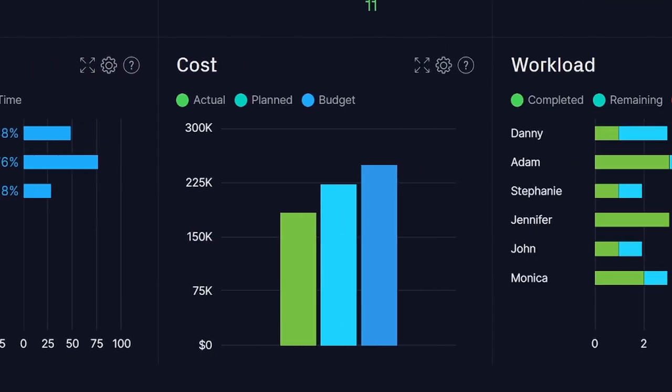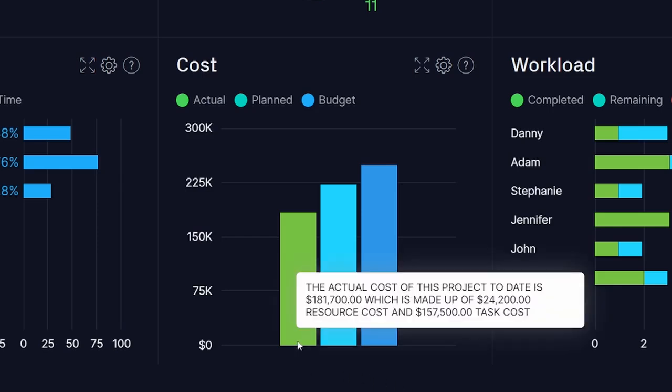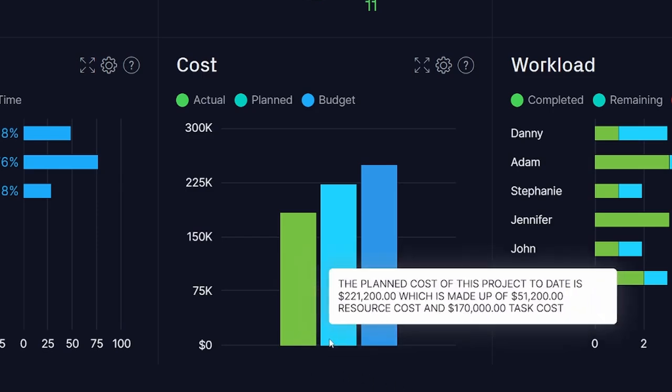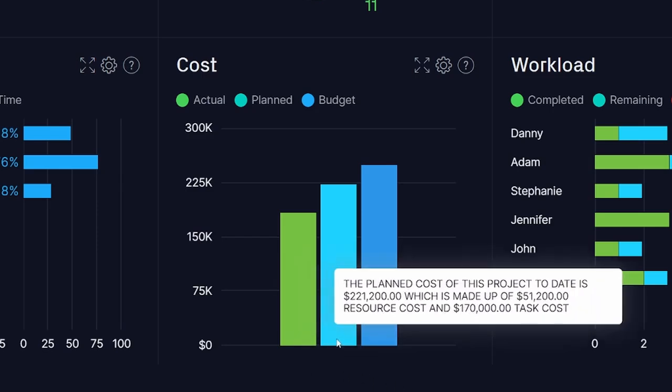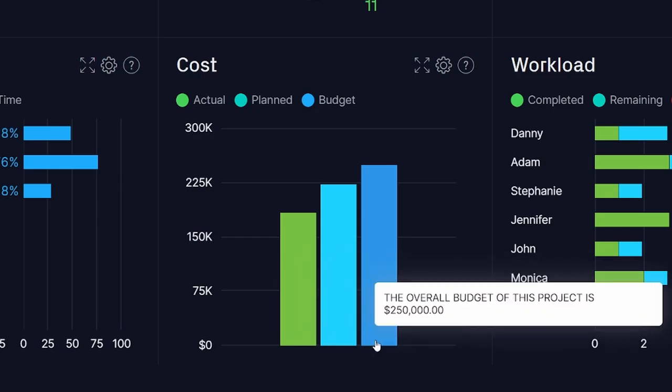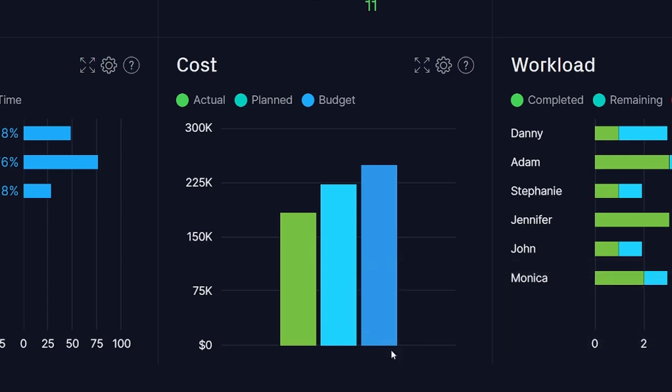The Cost panel will let you know if your budget can handle the new strain by showing you your actual costs compared to your planned costs, as well as the entire project budget.